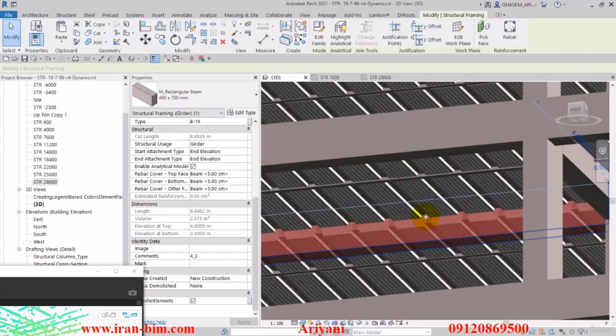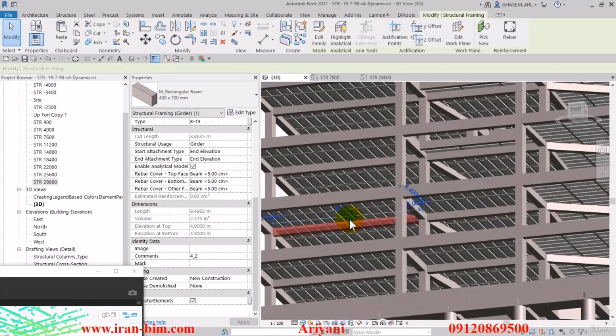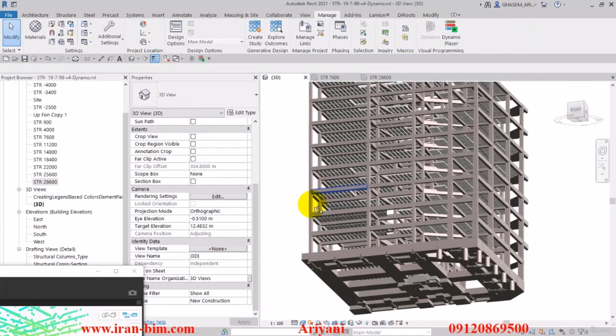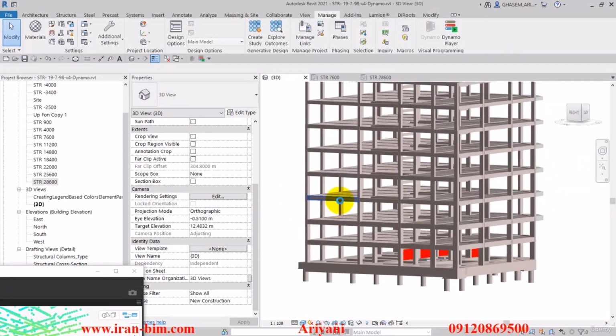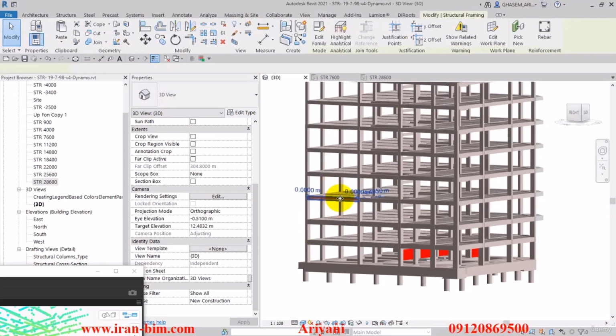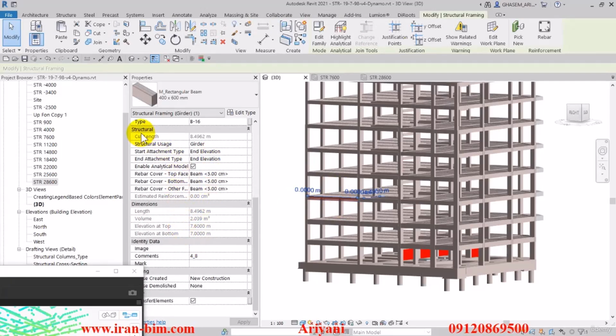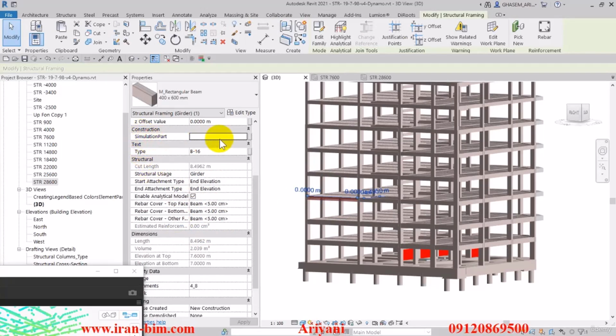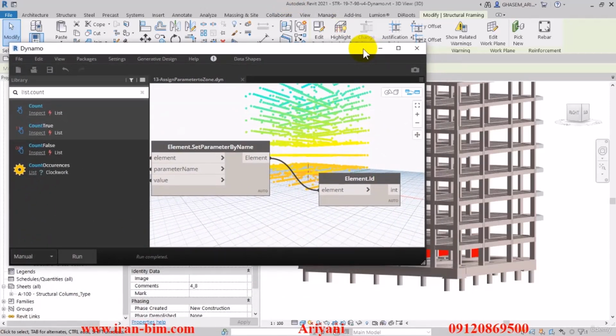Now you can use these later on in Navisworks, because if you remember, we had created an item here in the Revit file called simulation part, and I can even show it here to you. It's right here. We can specify a name to it here, and then we can give it an ID in MS Project so that we can refer the time to the object after we had done the linking process. You can do the same thing using Dynamo with your zones and do the simulation based on zone by zone in the